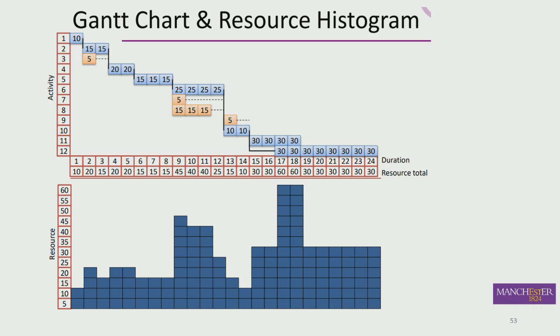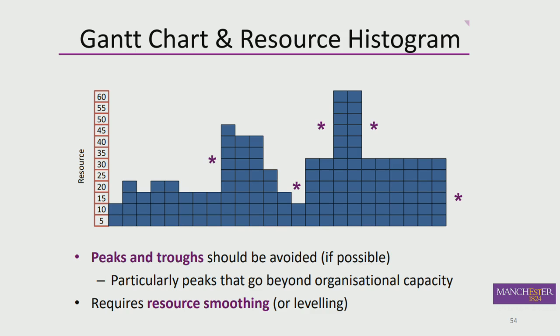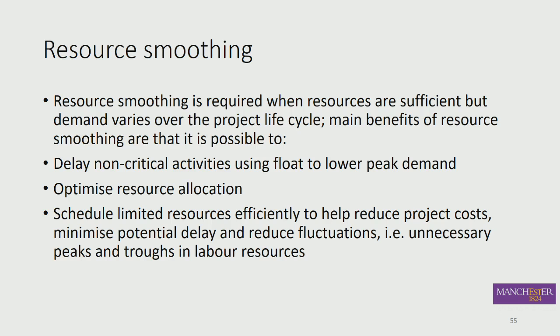So imagine if your inspection project had this resource profile, then if something went wrong, your shutdown and turnaround could suddenly turn into 3 weeks, and someone's going to lose a lot of bonus in the city somewhere because there's not going to be much profit for a week, for example. So that's why you should do this resource smoothing. And how you can do the resource smoothing is to use the float, the flexibility in your plan.